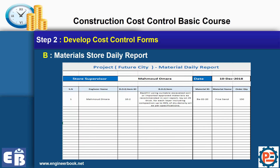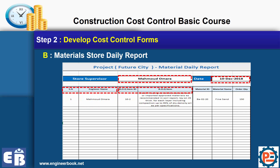When it comes to materials, we need to know the engineer name who exchanged the material, the date it was exchanged, the BOQ items, material name, and quantity. The reason we ask this information from the stores is to do comparison reports — to check the material exchanged from stores against the executed quantity. For example, we may say: you exchanged 500 square meters of porcelain tiles but only installed 400. Where are the remaining 100? Is it missing on site or is the wastage percentage very high?